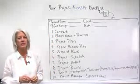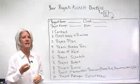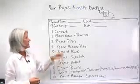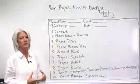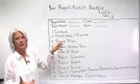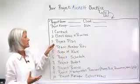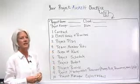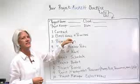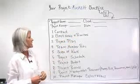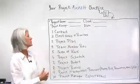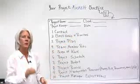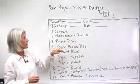Number one is the contract — making sure you have a signed contract that authorizes you as the project manager to begin this project. Not only the contract for the project but also contracts for other vendor partners who are part of this project. Number two is clearly identifying and documenting the client needs and the priorities. Because as time changes throughout the project, those needs and priorities are going to change, so you want to document what those initial baseline needs and priorities are.